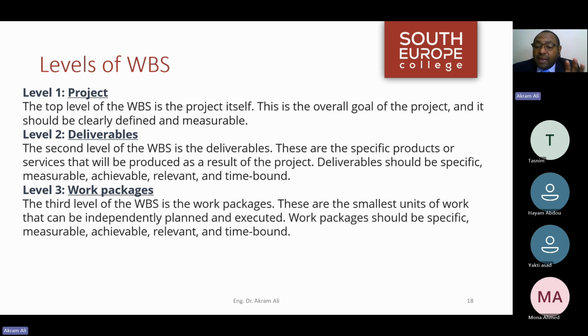So now I can have these as milestones, and I can start to assign payment against milestones for such parts of the product. But when it's finished, I have an object. It's not divided into plumbing or electric wiring. It's not by a type of trade. No, it is by a component or part, a physical part of the project itself. So I start to decompose my project into the smallest possible product